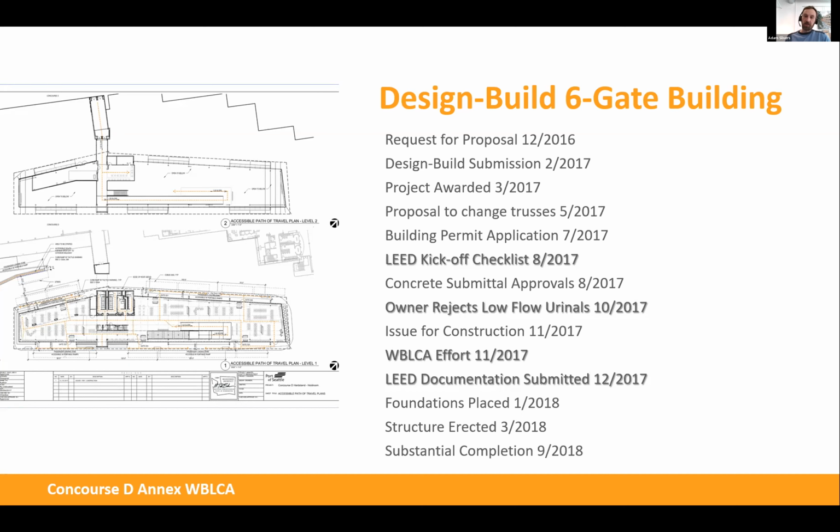And I just talked to the concrete foreman and said, what's the lowest cement content you can comfortably accept? Can we do a high cement replacement on this project? And he said, yeah, I have some experience with Cal Portland's 50% slag mix on my previous project, so I'm okay with that. And I talked to Cal Portland about those limitations and any potential issues, and we were on our way. We switched the mix after we had approved it the first time.